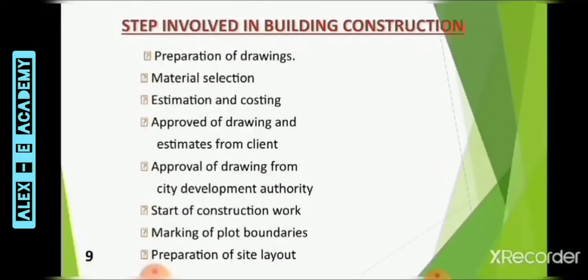The next slide covers steps involved in building construction. The first step is preparation of drawings or plans. The next is selection of suitable and cost-effective materials. Next step is cost analysis and estimation. After that, we present the plan to the client and check whether it needs modification. After modification, we approach the building control department of the local authority for sanction of the building plan. Then only we start construction, and mix boundaries and site layout preparation are carried out.